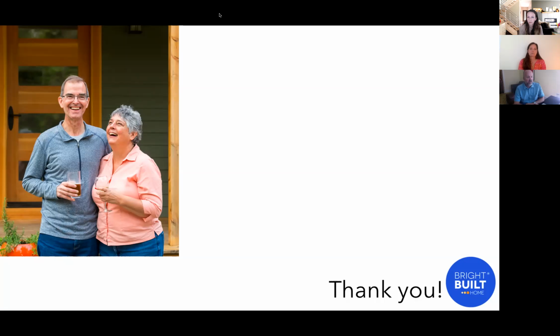And Sheila's asking, with the Murphys, was the solar array part of the package? Solar is something that we will include in the initial ballpark so that there's an understanding as to roughly what the cost will add, but it's not something that's included in the construction costs in general, because in any project, if someone were to be shopping around, for example, from builder to builder, no builder will include the cost of 30 years of utilities in the cost of construction to build the home. And that's effectively what a solar array represents. It represents the cost of utilities for 30 years for the home, amortized over the life of the mortgage.